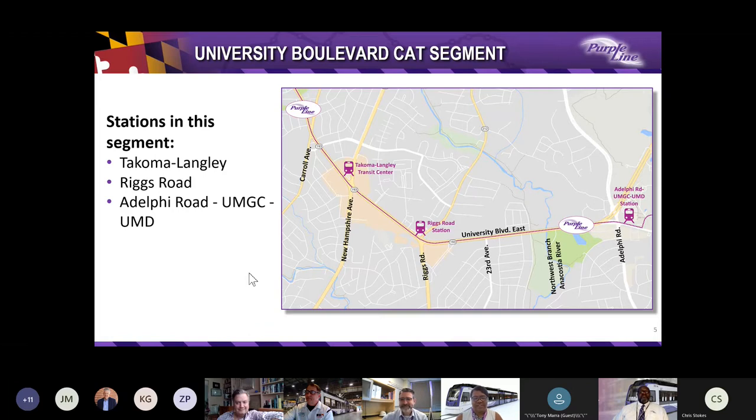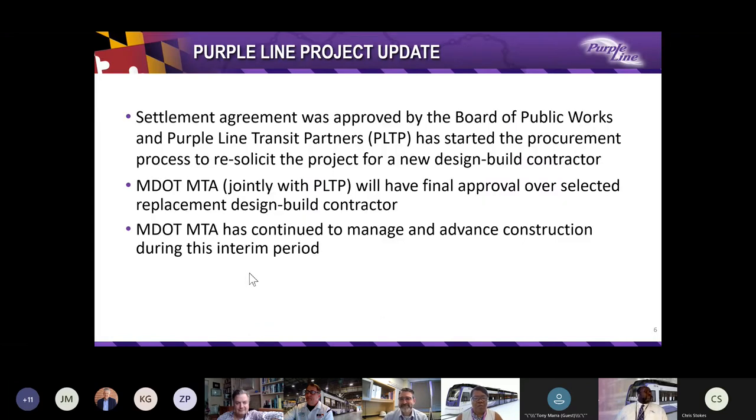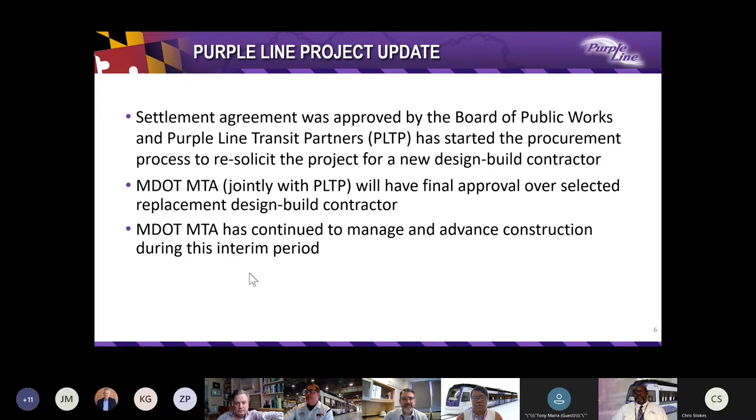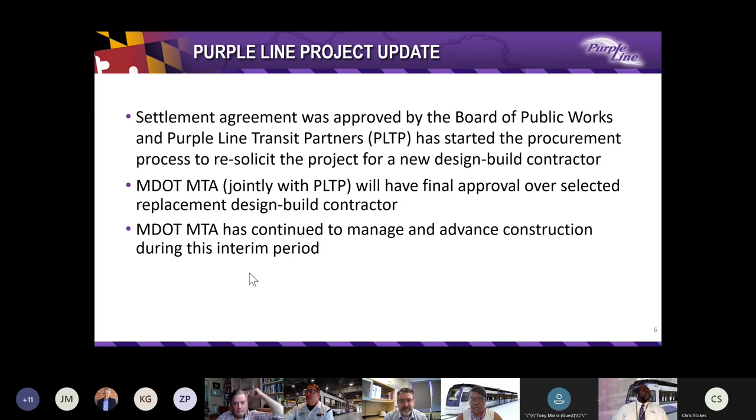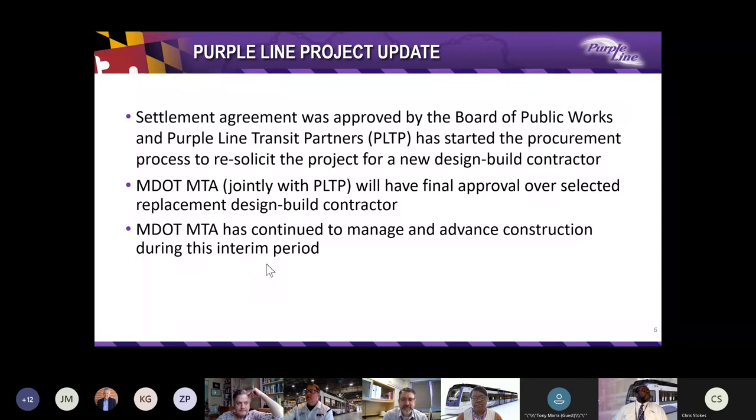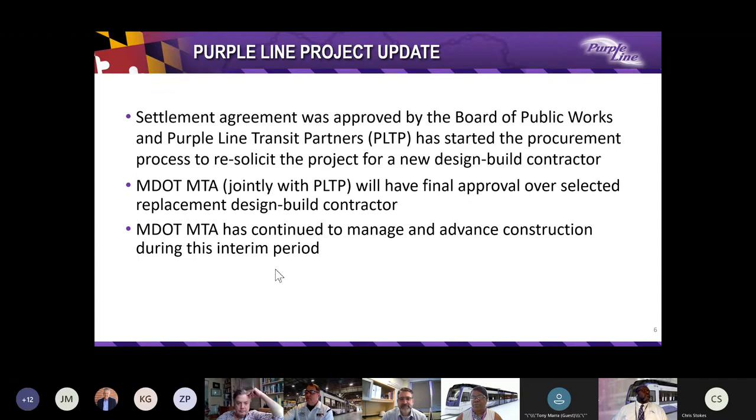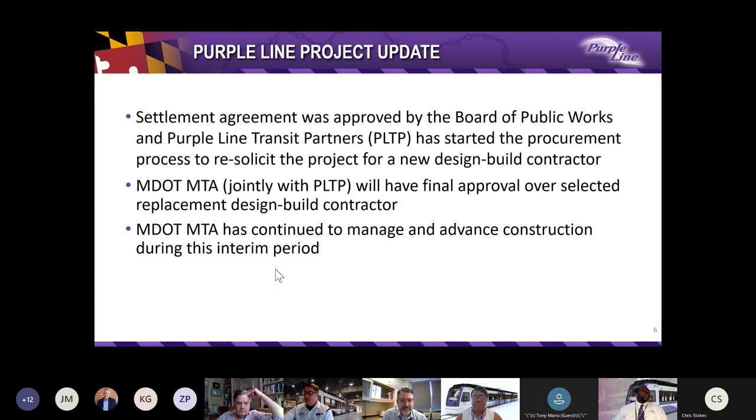Hello again. This is Anita. I would like to go over a brief synopsis of where we are and provide you a project update. As far as the settlement agreement is concerned, we were approved by the Board of Public Works, and the Purple Line Transit Partners has started this procurement process to re-solicit the project so that we can get a new design-build contractor. MDOT MTA joined with PLTP will have final approval over the selected replacement design-builder contractor. In addition to that, we will continue to manage and advance the construction during this interim period.